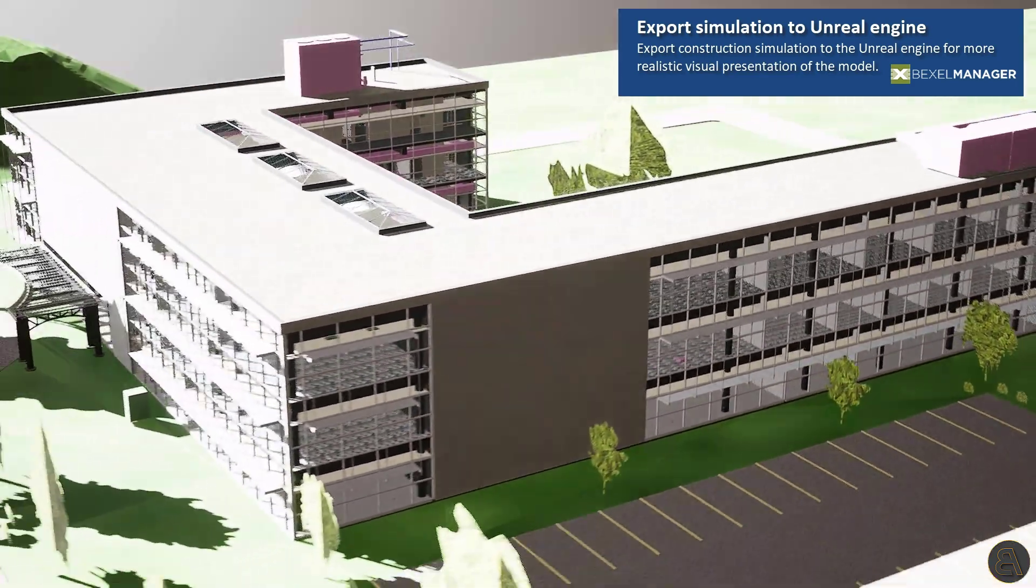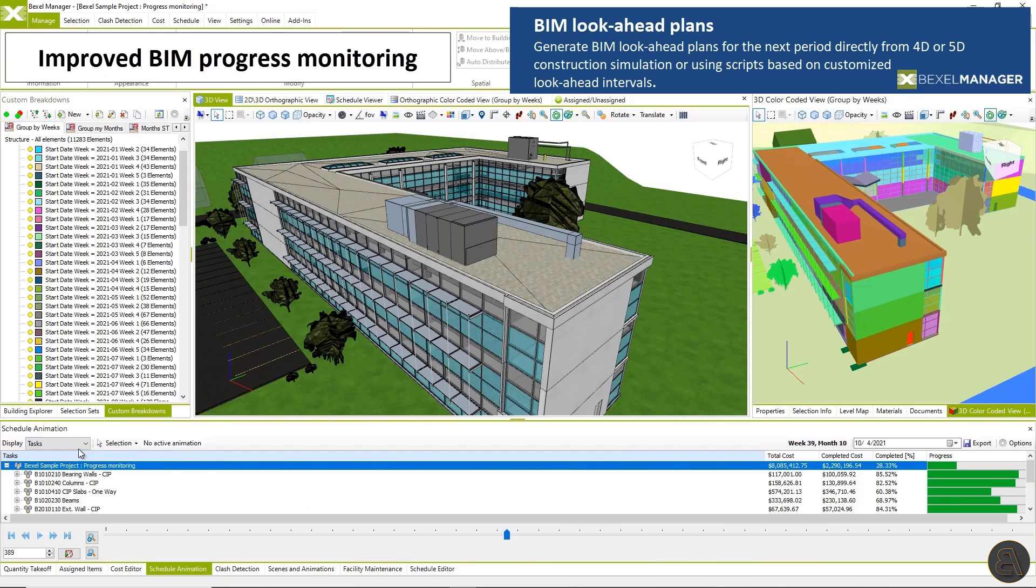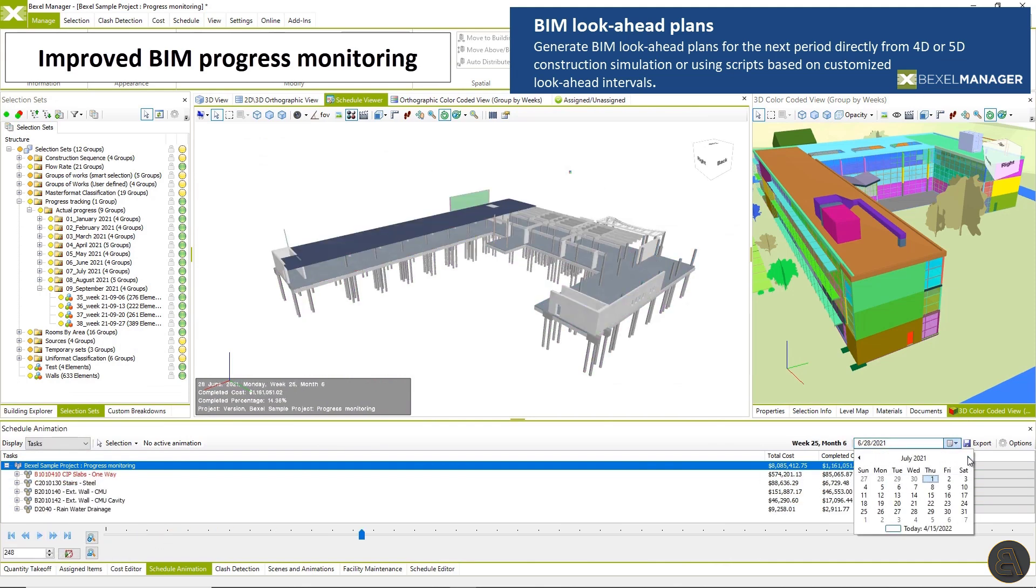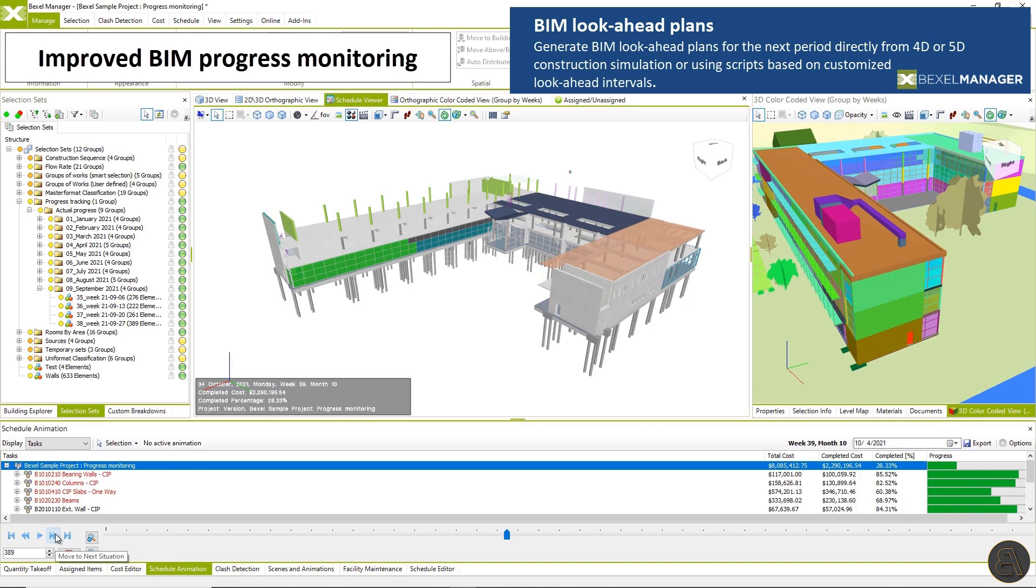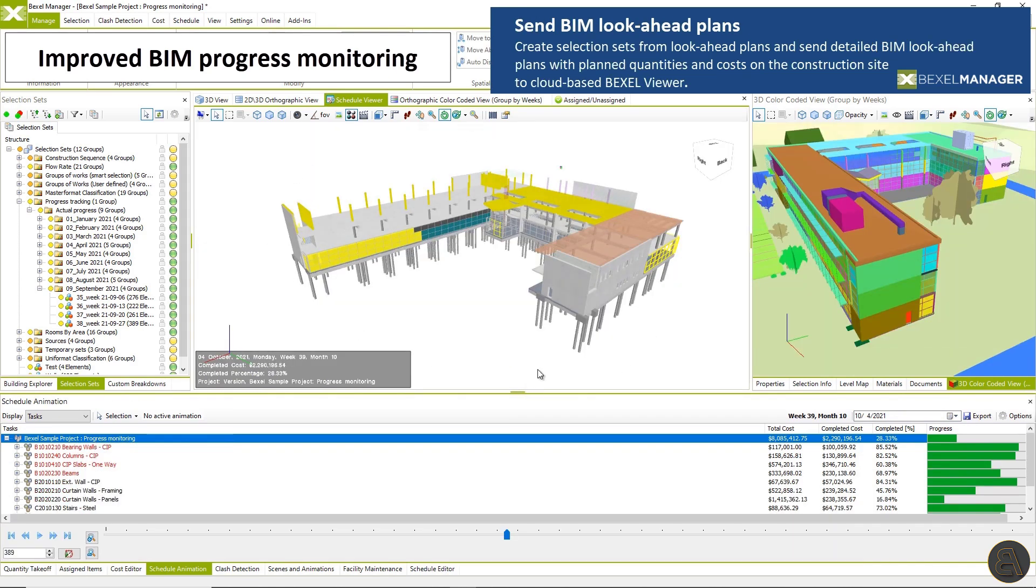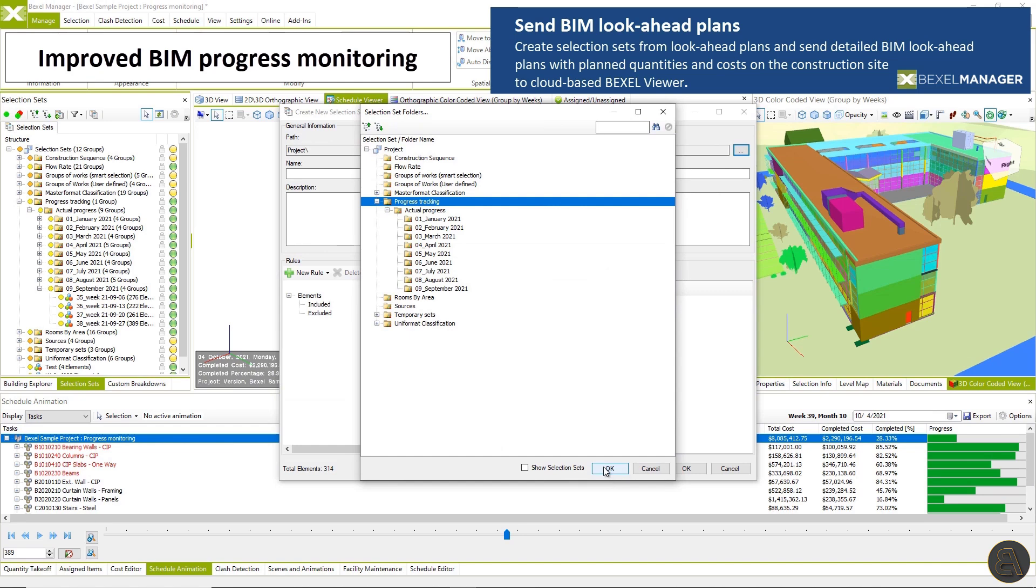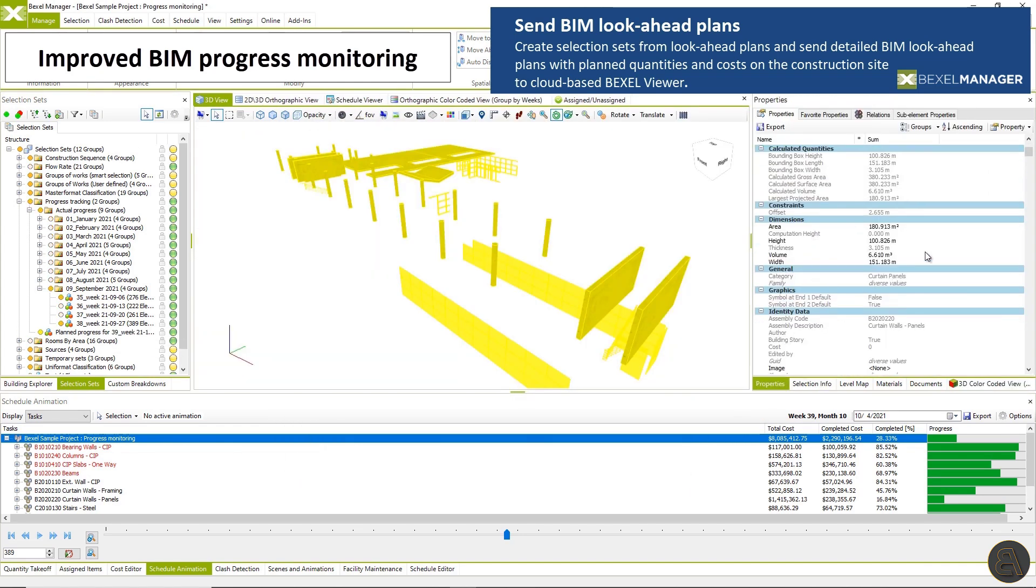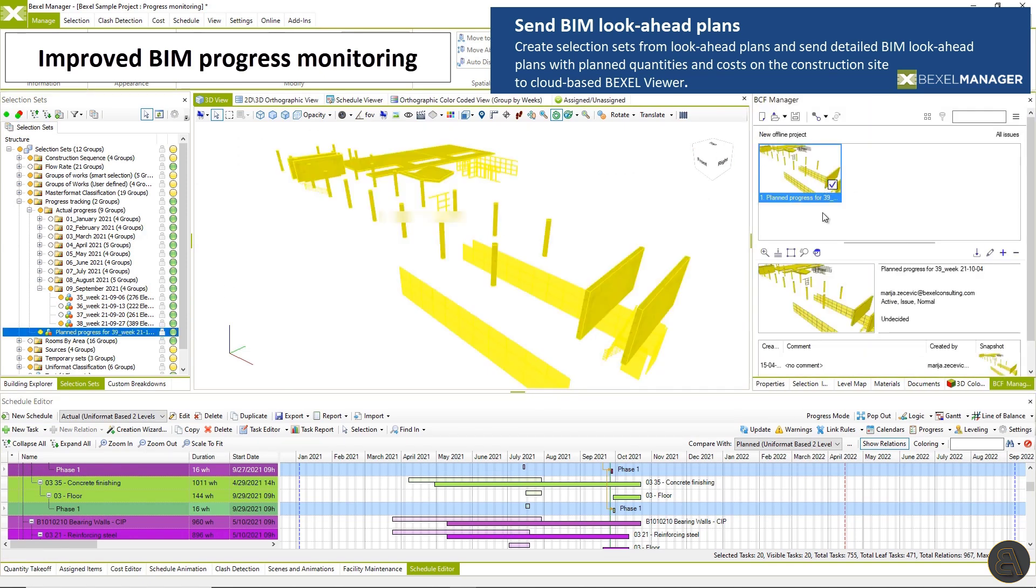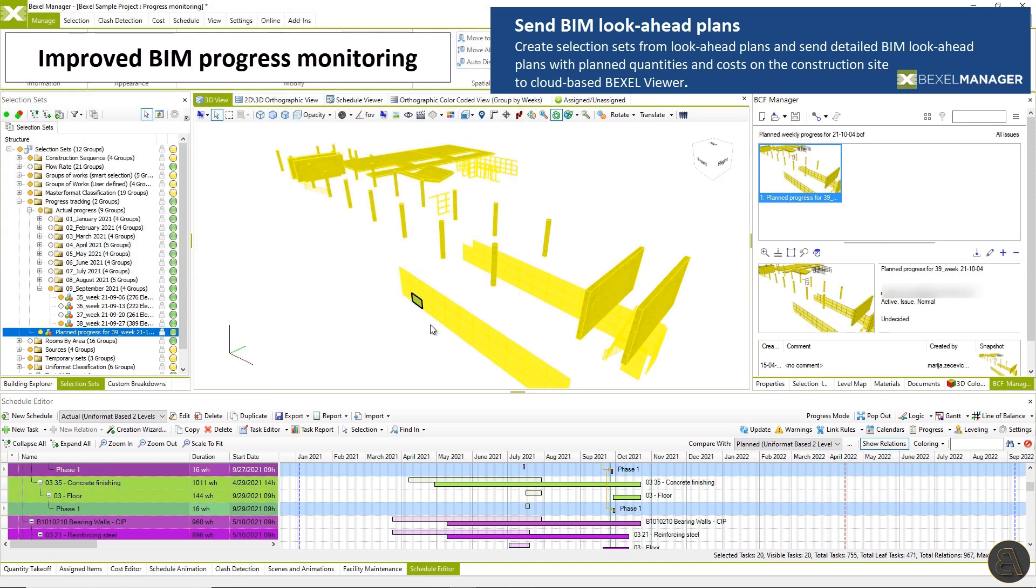And the final step in the integrated workflow BIM progress monitoring. Generate BIM look ahead plans for the next time period directly from construction simulation and create selection sets with elements planned to be executed on the construction site. Send look ahead plan via BCF manager by drag and dropping created selection set to a cloud based Bexel viewer.